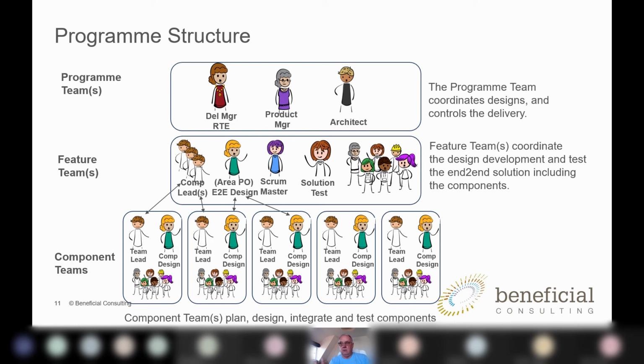So if you're doing third parties, you might need to have a much more detailed requirements spec than if you've got an in-house team that's developing it, because at some point you're going to get procurement involved, and at some point somebody's going to want to say, why are we paying this organization for this amount? And you're going to need to control that, and you're going to need to test what is delivered coming back into the organization.